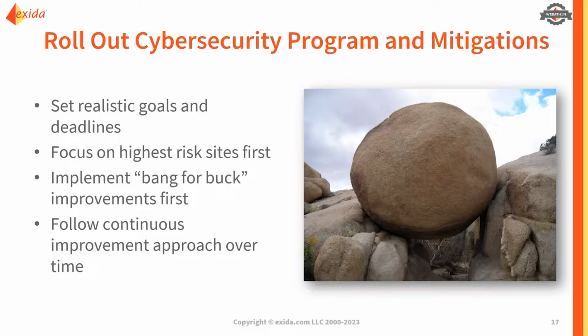The next thing is we've got to be sensible in our approach. It's not possible to deploy cyber countermeasures to 100 sites simultaneously, or even if we only have 10 sites, we should really be focusing on the highest risk site first. Or if we only have one site, but we have multiple areas in it, we should focus on the most critical areas first.